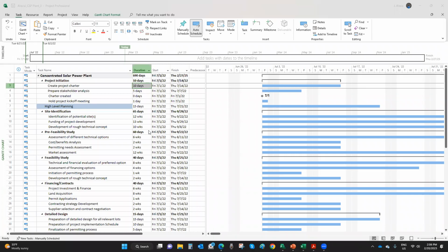Now, there is another thing students usually ask about: the 8/80 rule. The 8/80 rule states that a project work package should be no shorter than 8 hours and no longer than 80 hours. As you can see here, we have violations of this rule because I do have some work packages that are going to be longer than 2 weeks, 80 hours.